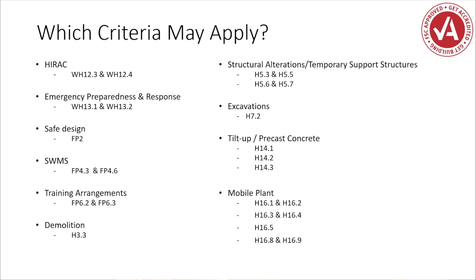For safe design, we have FP2, ensuring a risk assessment is undertaken to identify and assess buildability issues — so where we're going to be setting up the crane and the location of any structures which may be impacted. Then we have SWIMS. Everyone's aware that SWIMS are required for relevant high-risk activities and cranes are no different. The key point is that SWIMS must be site-specific. What we find a lot of times is generic wording that is not site-specific and doesn't concentrate on the work actually being done on site, which is the whole intent of the SWIMS.